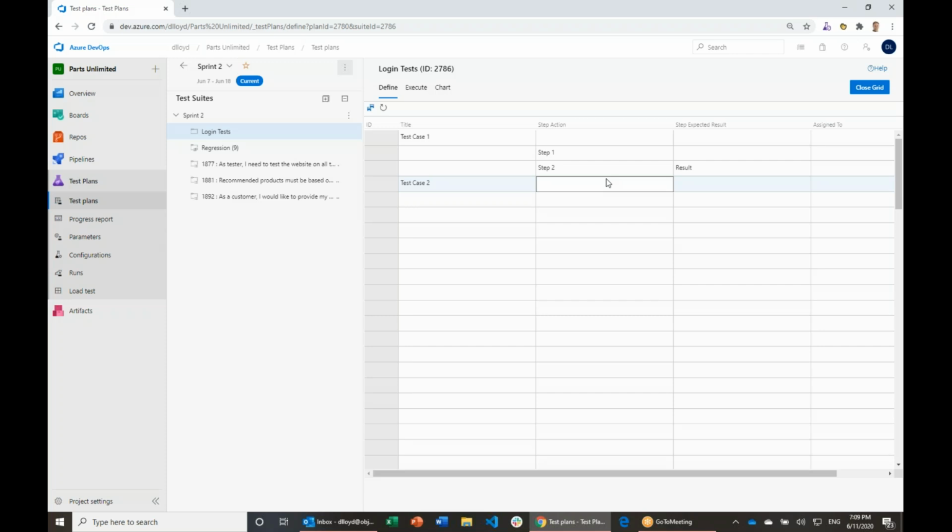But the problem is they're not attached to stories. And you really want your test cases to be attached to stories because you are testing something, right? You want the traceability through the product. One of the great benefits of Azure DevOps over all other products in the market is that even though there's Azure Boards and Repos and Pipelines and Test Plans as separate products, they're interrelated. They're connected. So I can go into my boards and I can create myself a sprint or a backlog or a team with a backlog and a sprint, and I can add the stories to them. And then I can add test cases to those stories. And as I validate the test cases on those stories, I can see those test results in my reporting, throughout, right through builds and releases, everything is just interconnected.